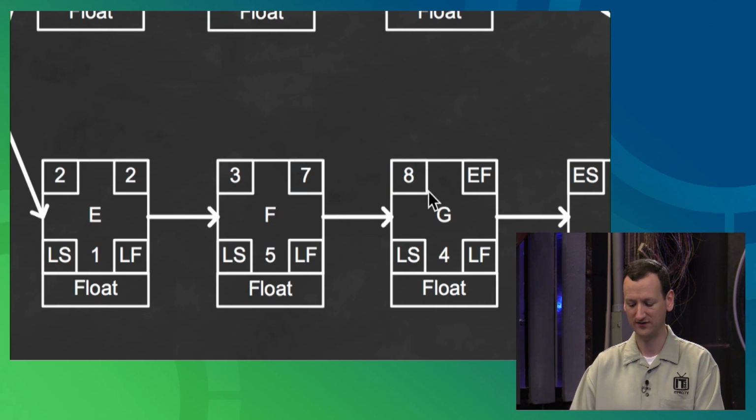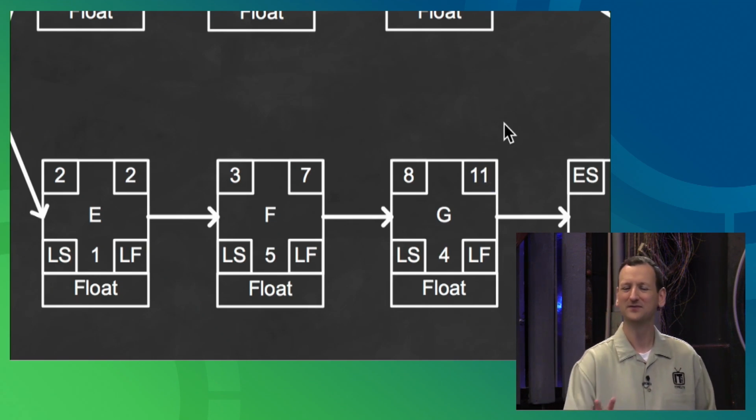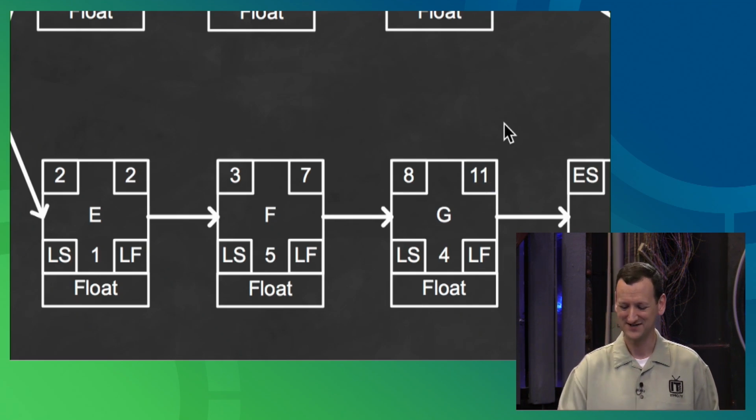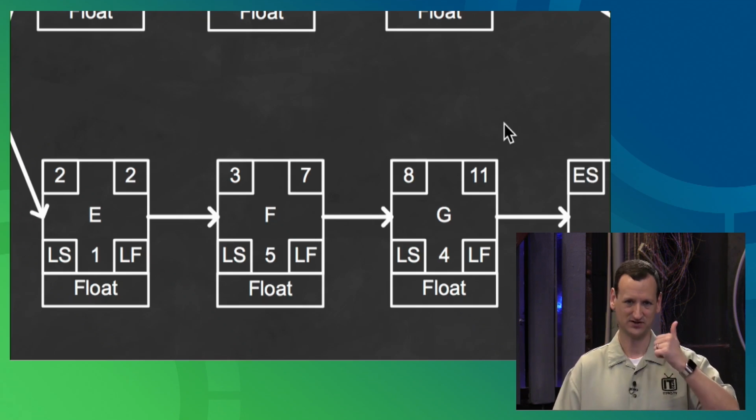It can start on January 8th, and it's a 4-day activity. And so that one's going to finish on, let's see, that would be the 11th. There we go. If you need help coming up with these numbers, you can count on your fingers if it's a small number, right? So I can go the 8th, 9th, 10th, 11th. That's one way to do it.